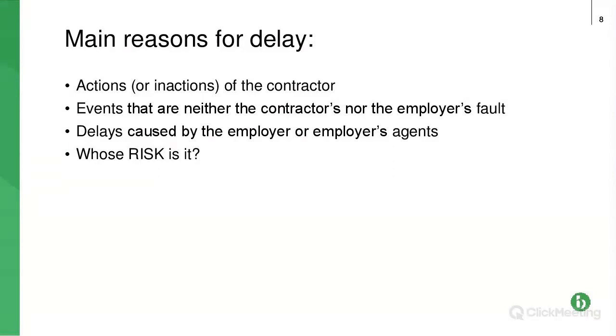That makes absolute sense. Typically, if the contractor does something that causes the delay, so an accident on site, which is caused by the negligence of the contractor or other people engaged by the contractor, that will typically cause some delay, and that's the contractor's responsibility.